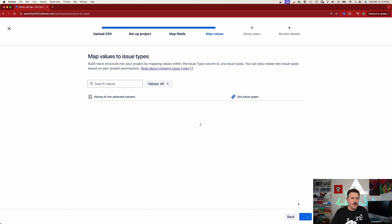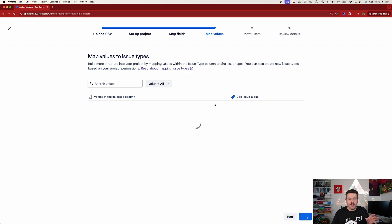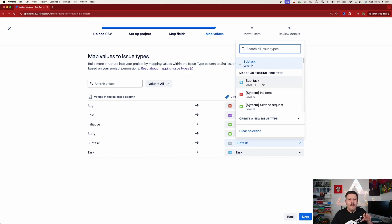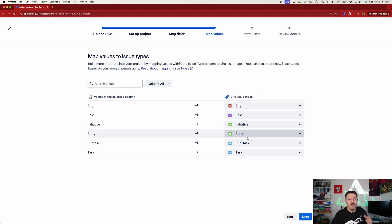Click Next, and this new screen lets you map your issue types to the issue types in Jira. You want to make sure your subtask is correct. In this case it mapped me to a level zero subtask, but I do not want that — subtasks are supposed to be level negative one. I actually misspelled the subtask name in my file, which is a common mistake, so make sure you map it correctly here so it imports as a level negative one type. This is very important.